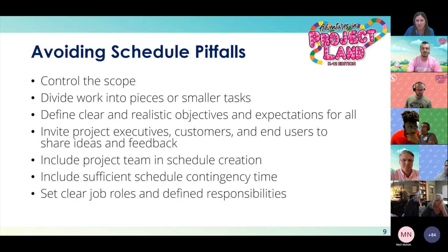Include the project team in schedule creation. When you schedule in isolation, you don't have all the facts. You need to hear everyone's opinions, how long they will need for their tasks, and their schedule restrictions. Building a schedule alone does not allow for this, so teamwork will make the entire team accountable for their schedule. Also, plan to meet regularly with the team.